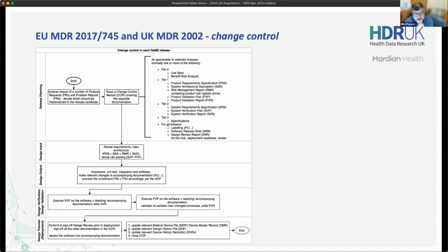Have you changed a feature enough where you want to study the clinical performance, so you haven't quite changed the intended use, in a bit of a gray area of some of these. Have you changed the clinical performance enough? Have you changed the user interface enough where you want to study again, can people use it safely, but without changing the intended use? That's a tier 1 change. So tier 2 change needs re-verification, tier 1 change needs revalidation.